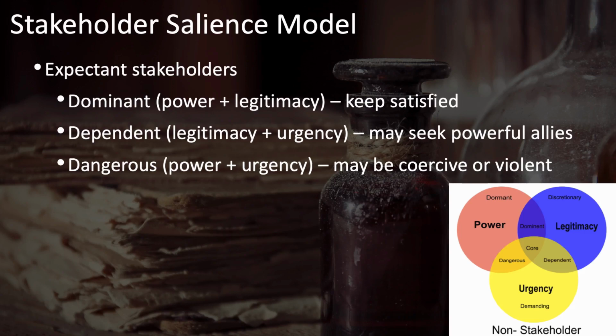Third, we have the dangerous stakeholders. These are people that have both power and urgency, but no legitimate reason to be involved in your project. However, these are people that may use their power and interest in violent ways, such as sabotage or even terrorism.